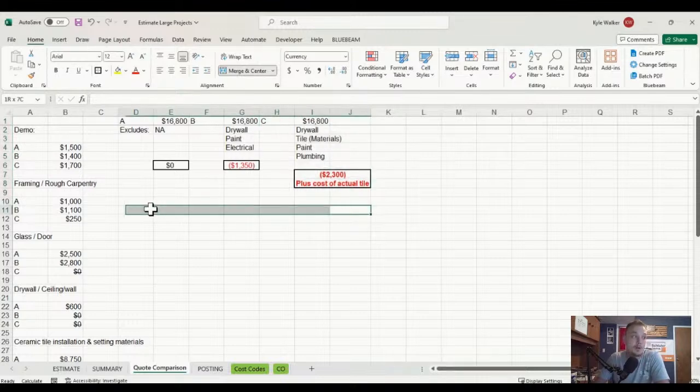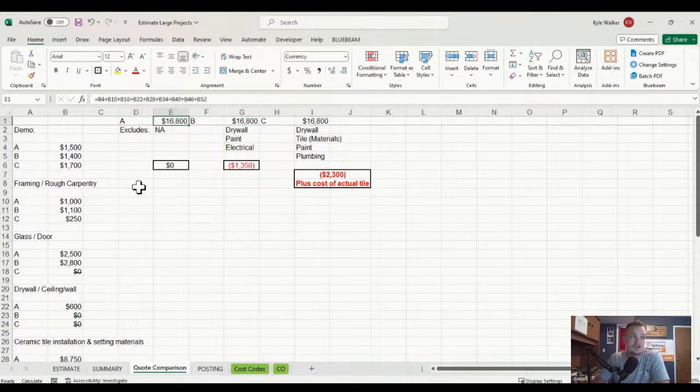I'm a huge proponent. Once I started using the PSA, I realized after the first one, I will never go back. My business coach turned me onto it, and it provides a lot of meat. It's my pricing. Here's what I'm going to give you for my pricing. I'm going to give you $16,800, but I'm also going to describe to you what materials I'm using. I'm using Schluter, the whole Schluter system. It includes a lifetime warranty. Here's the thin set I'm going to be using. Here's the banding I'm going to be using. Here's the drywall mud. Here's the paint, the color, the type.